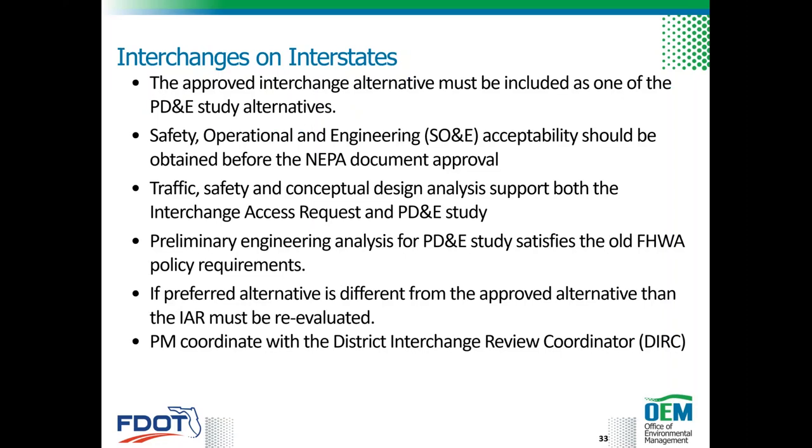So whenever the project includes a new or modified interchange, the alternative approved in the interchange access request, or IAR, must be included as one of the PD&E study alternatives. Also, safety, operation, and engineering, or SONE, acceptability should be obtained before the NEPA document is sent to OEM for approval, or prior to final approval.